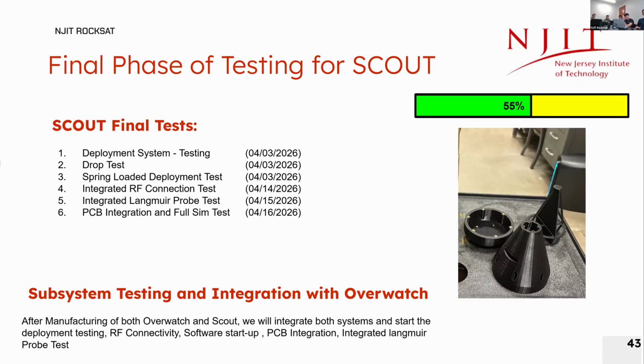Subsystem testing and integration with Overwatch. After finalizing the manufacture of Overwatch and Scout, we will integrate both systems and begin the deployment, RF, software, PCB integration, and integrated Langmuir probe testing, and that will move us from 55% to 100%.